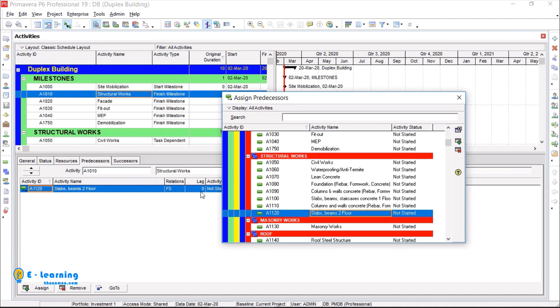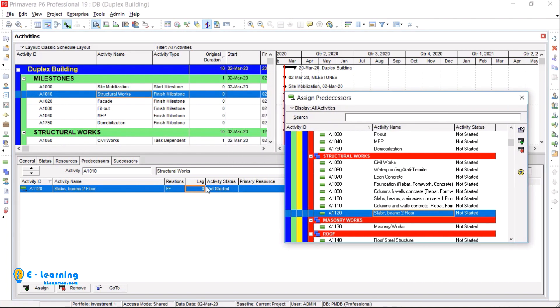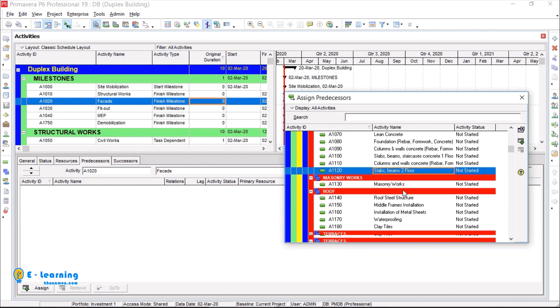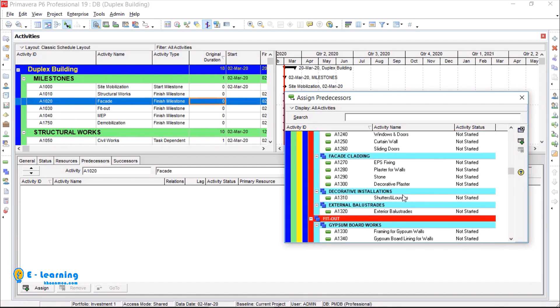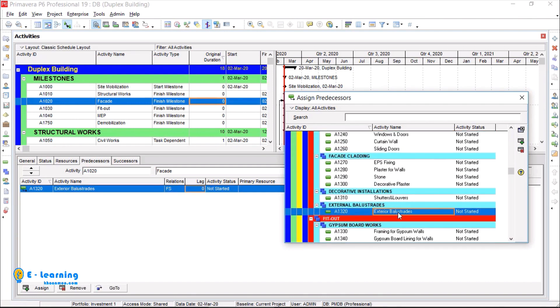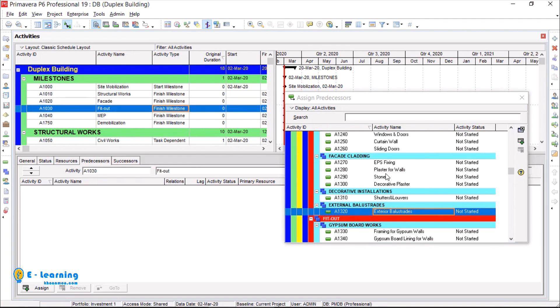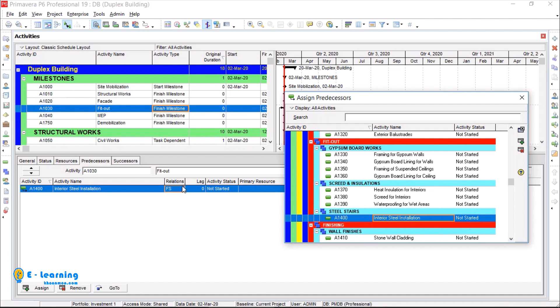From relations I select finish to finish. Lag can be delay or lead. Positive lag is delay and negative lag is lead. Here it is zero, not a lead or delay. The third milestone's predecessor is exterior ball straights. Double click. Relation is FF with zero lag. I assign other three milestones also.